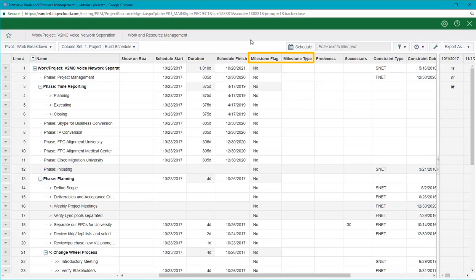A milestone is a significant point or event in the project, usually indicating a deliverable or the end of a phase. Milestones have no duration. They cannot have a resource assigned to them. They are always on the lowest level of the work breakdown structure once they are created. And they are either open or closed and can only have either a 0% or 100% completion status.